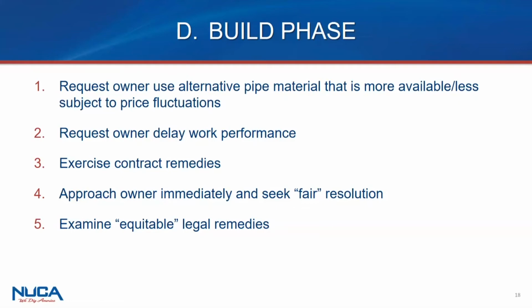So I was going to add in there, Tom, that I've found that every private owner, it seems, is willing to negotiate this almost despite the contract value, because they realize that a contractor going out of business is going to be bad for their bottom line on that very project. To find a new replacement contractor to come in and pick up the schedule is going to be very difficult. And I think that's the driving force, even with the DOTs around me and obviously around you, Tom, is that the owners are willing to talk about this when they realize that you're not making up for a failed bid.